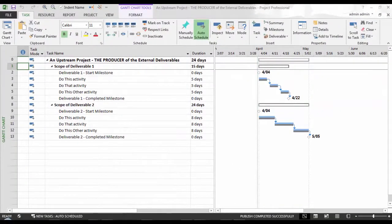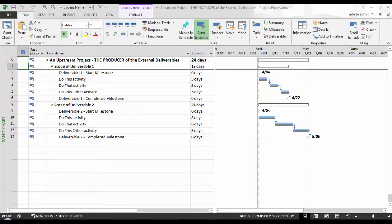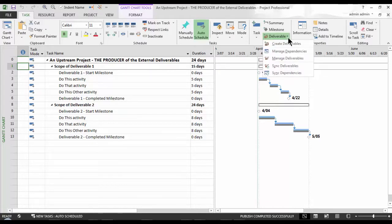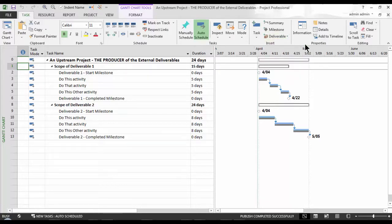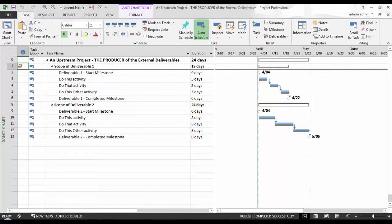Well, this is where the Deliverable feature comes in. Allow me to save, close, and check in this downstream project. Note, I have only changed the settings in the Cross Projects Linking Options section. I have not accepted the change in the upstream schedule. To set up a deliverable is as follows. Here, I have the upstream project open, and I have reset my duration for that simulated task slippage for the time being. I will tag the summary tasks, which happen to represent the deliverables start and finish accordingly. To do so, I will begin with Deliverable 1, which happens to be on row 1. Once selected, I will click the Create Deliverable menu item here on the Deliverable dropdown in the Task Ribbons Insert group. Notice the bronze-colored cube icon that appears in the Indicators column. It's that simple.